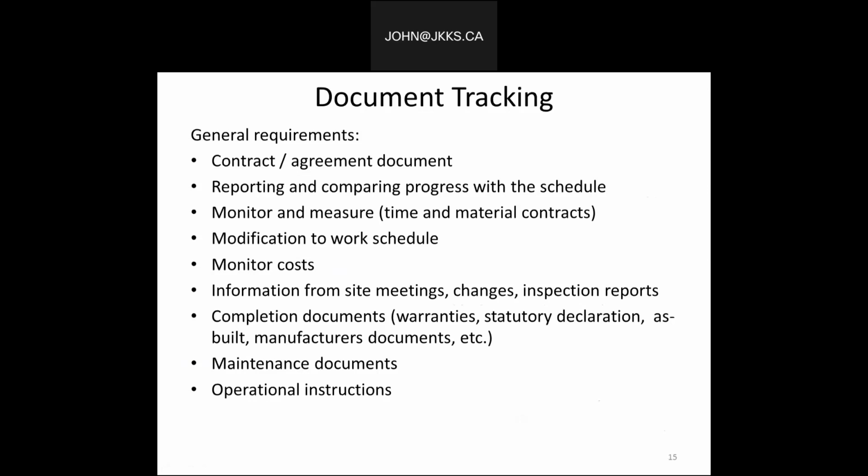notifications of different equipment that's being supplied, or shop drawings, what is being built in the shop and what's going to be arriving in the field. So again, information such as that. Changes to the actual construction site need to be recorded, and so on. The most effective way to collect these documents is to give notice right from the very first site meeting that these are required, need to be collected, and in many cases will be handed back over to the owner.